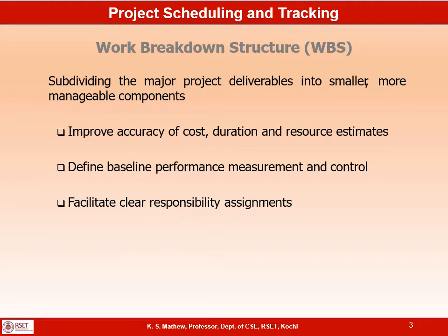The basic input needed for preparing a schedule is the WBS, work breakdown structure. Work breakdown structure is a subdivision of major project deliverables into smaller sub-deliverables. Even in the beginning stages of your project, we will be able to identify the major deliverables, which will normally be documented as part of your project initiation document or the project charter. There we list out the major deliverables of the project in different phases. In every phase there will be a major deliverable.